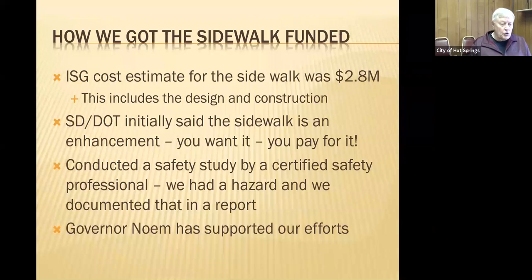So how do we get this addition, and how do we get it funded? Well, ISG provided us a cost estimate for the sidewalk of $2.8 million. That includes both the design and the construction. And I might add, that is a bare bones cost estimate. We didn't inflate that as we went and asked DOT and asked Governor Noem for help in this area. We wanted to keep it as bare bones and as accurate as we possibly could.